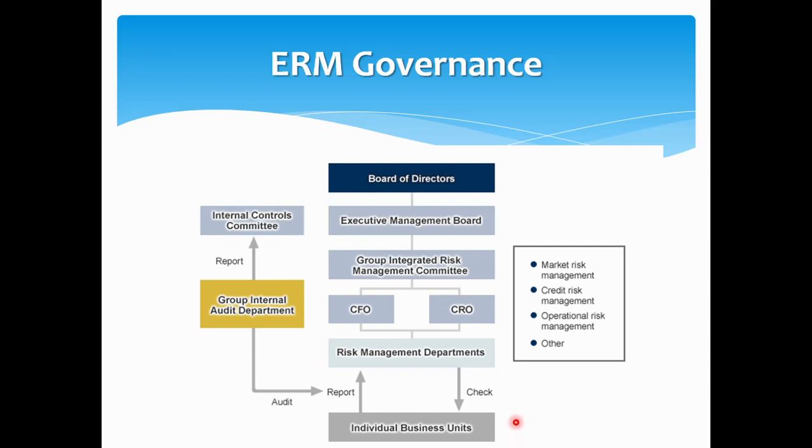In our organization also, it reports to the board appointed audit committee. What we have implemented is that we have risk representatives in each division. In each division, one member is trained. In my technology division, the information security manager is trained to handle the risks. He understands the information security and technology risks, as well as, in a global landscape, the enterprise risk. So in each division, we have a risk representative so that escalation to the risk committee happens if there's a risk event.